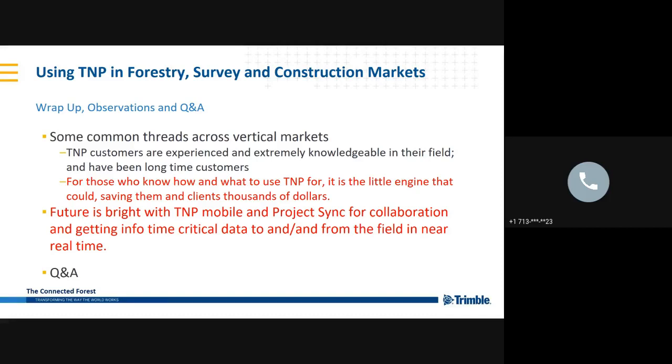And the environmental groups always do delineations of 300-foot wide swaths down the center line path, and we would get their GIS files from their handheld GPS and plot them on our TerrainNavigator Pro. And now I'll let them go to the field and we'll stake them out before construction starts.